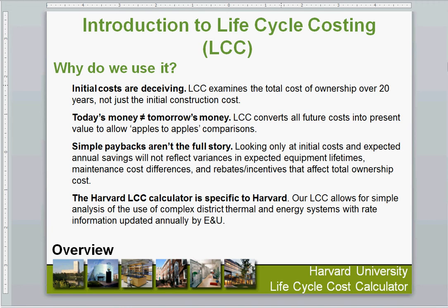So those operating costs can have a big impact overall. When we look at a building over 30 years, for instance, if you take particularly energy intensive buildings, those operating costs, which only seem like $1, $2, $3 a square foot a year, which seem relatively small, add up over many years and many square feet. When you look at restaurants, it's very common for the utility costs, the amount you'll spend on energy and water, to exceed the entire cost of construction of that building in as little as 30 years.